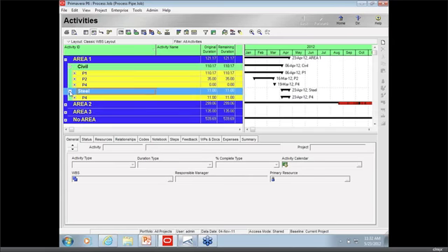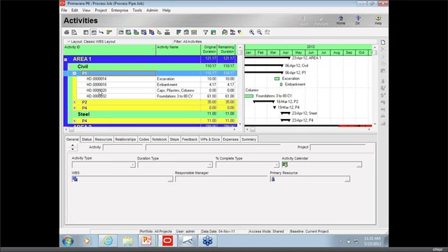But going back up to area 1, we can see that there are items assigned to both civil and steel. Expanding those out, we can see the priorities that have been established for some of these activities. As I expand out that P1 priority, we have essentially 4 items in the estimate that have been assigned that tag. So again, this is just another way of using information from the estimate, assigning variables that are more relevant on the scheduling side, allowing you to create your own custom work breakdown structure. Okay, awesome.